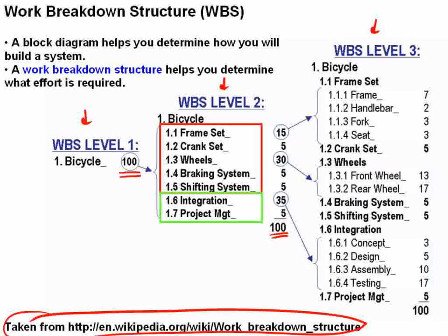And then in the next stage, we break each of these things down into the next level. You'll notice here we have detailed numbers talking about the overall percentage of effort required to put the bicycle together. You'll notice that overall, building the rear wheel and testing the bicycle are going to require much more effort than anything else, but we also notice we always sum to 100% effort.